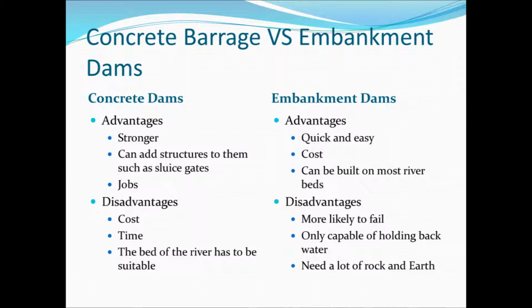Engineers usually do this by drilling holes in the rock, placing explosives in the holes, and then removing it once it has been blown. Once the spillway is complete, the river is then drained through it so that the site area is clear. Temporary small dams are set up both upstream and downstream to the site, so water can't flow back into it. Any water still left in the site is then pumped out.